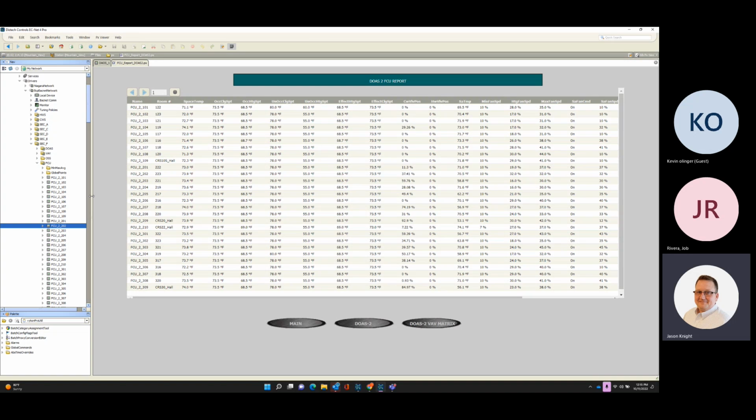That's been a point of contention on a couple of smaller jobs we've done previously, and they didn't really understand. They're like, no, we want to support them, and it turns into this giant bureaucratic mess. Well, you can't have an IP address until we get the MAC address of the device you're installing. But the device we're installing isn't going to be shipped until a week and a half from now. We can't get the MAC address until we get our hands on it, power it up, and set it up. Then they get upset when you're installing the stuff, saying, why isn't this online yet? Well, one, we don't have the IP address. Two, we can't get it until we actually get the product. And so it holds up the entire construction process.